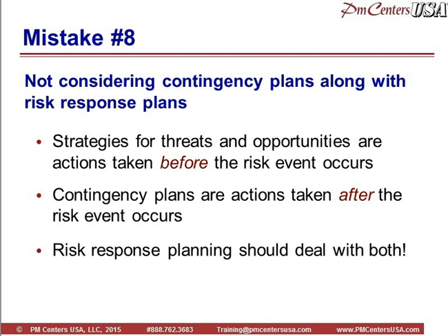Now, in the example I gave, the risk response plan would have been to say, okay, let's look at the schedule. Is there any way of postponing that work until May, when the weather's better, or even April, or move it up maybe to the preceding October? So can we move the schedule around to avoid the early March weather?